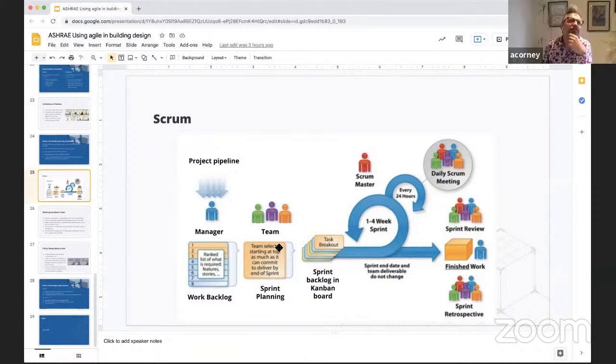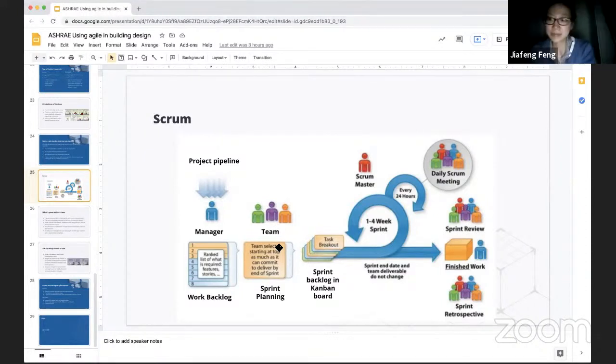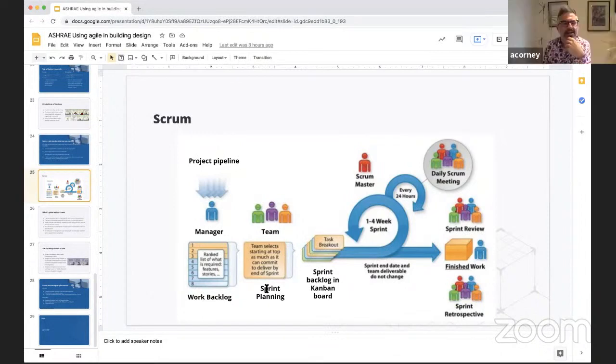Well, okay. In some tasks, it can be quite difficult to know how long it's going to take to do that task. And so sometimes what time boxing means is that you say, okay, we want you to do this task, but we don't want to spend more than 5 days on that task. Okay. And so that's the box of time that you're allowed to spend on that task, and you work towards the time limit.